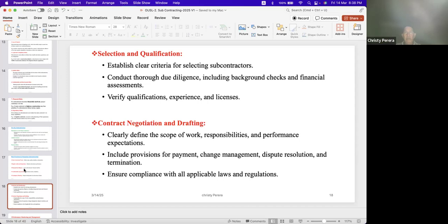And I said, okay, listen. Now you all have not done it in a proper way. You have not signed the agreement, the main contract and the subcontract agreement. You could have a price formula for that, mainly, because up to 6 months, okay, this price. If it goes more than 6 months, you will have to have a price formula agreed by both parties. So I explained to them how to prepare a price formula.